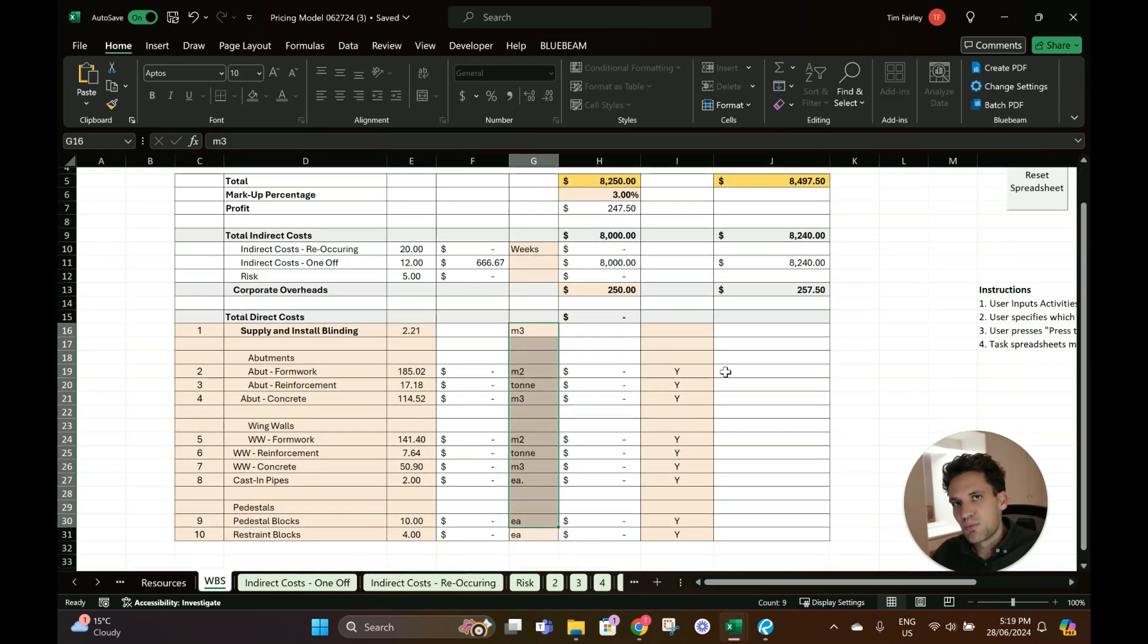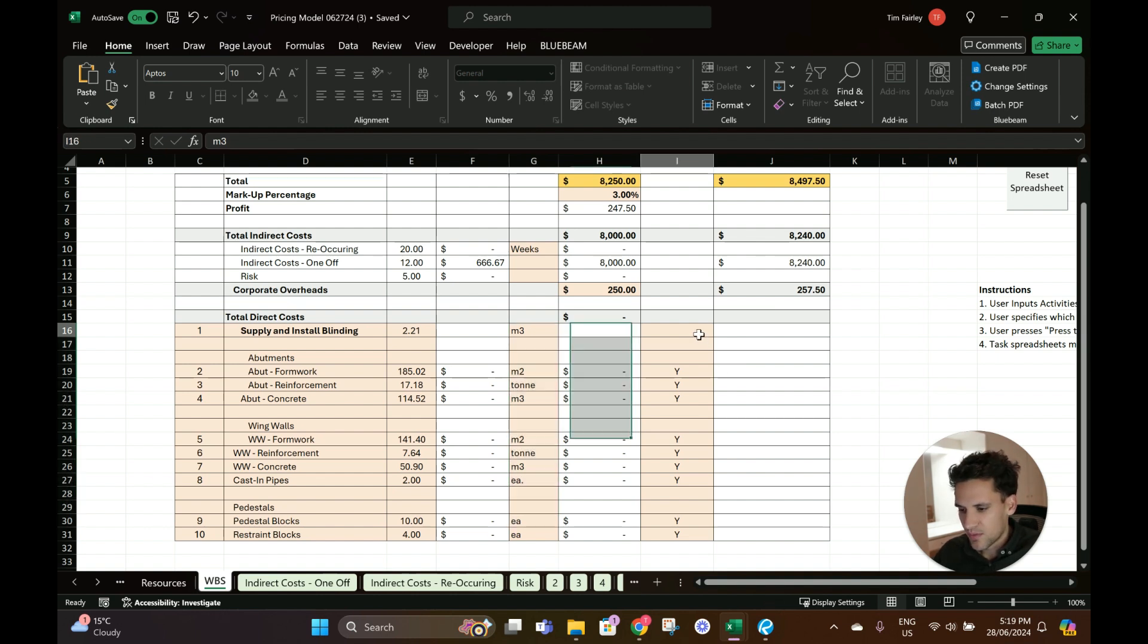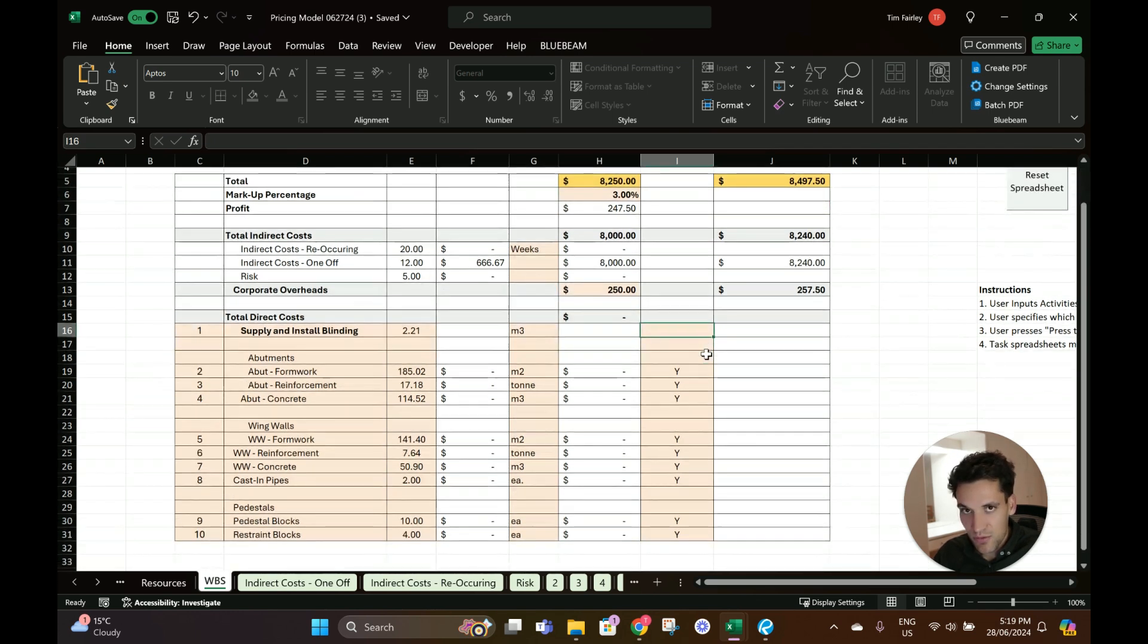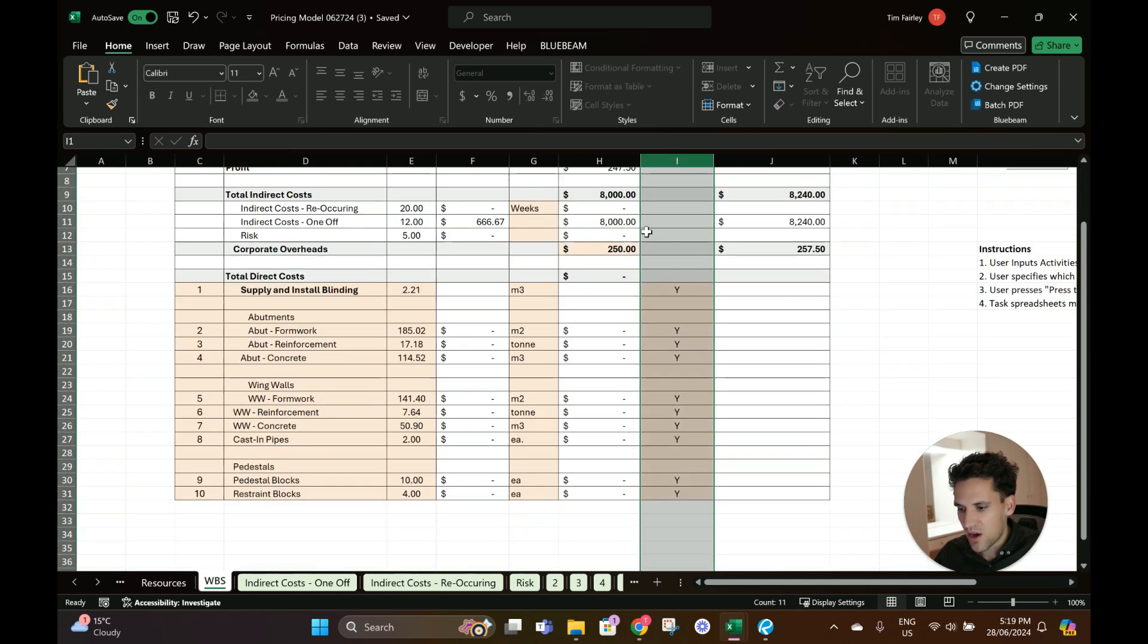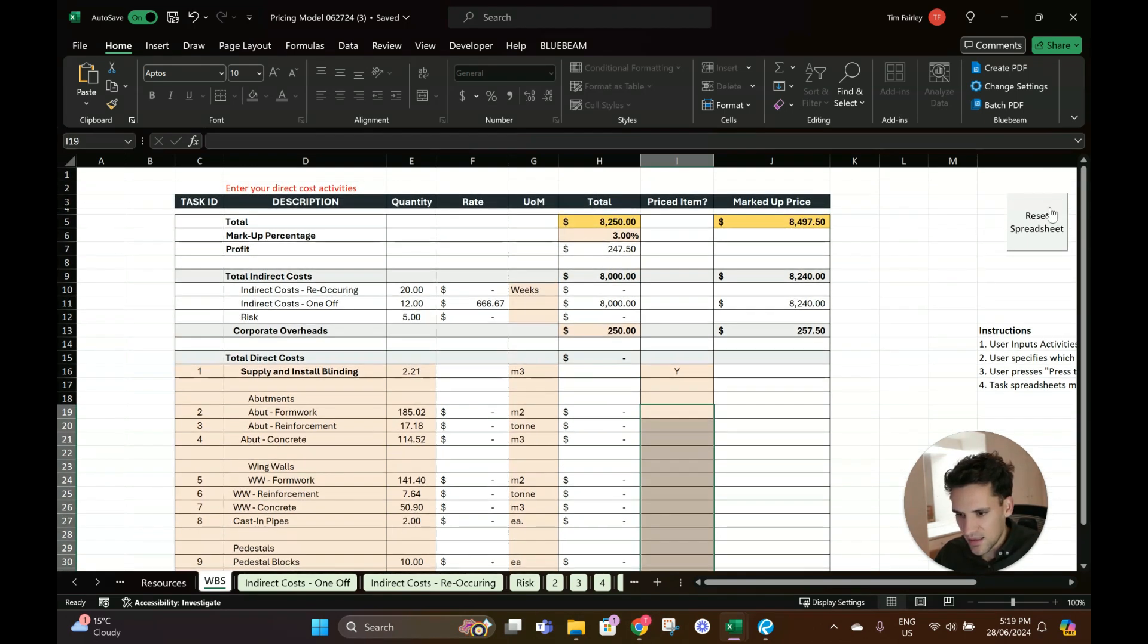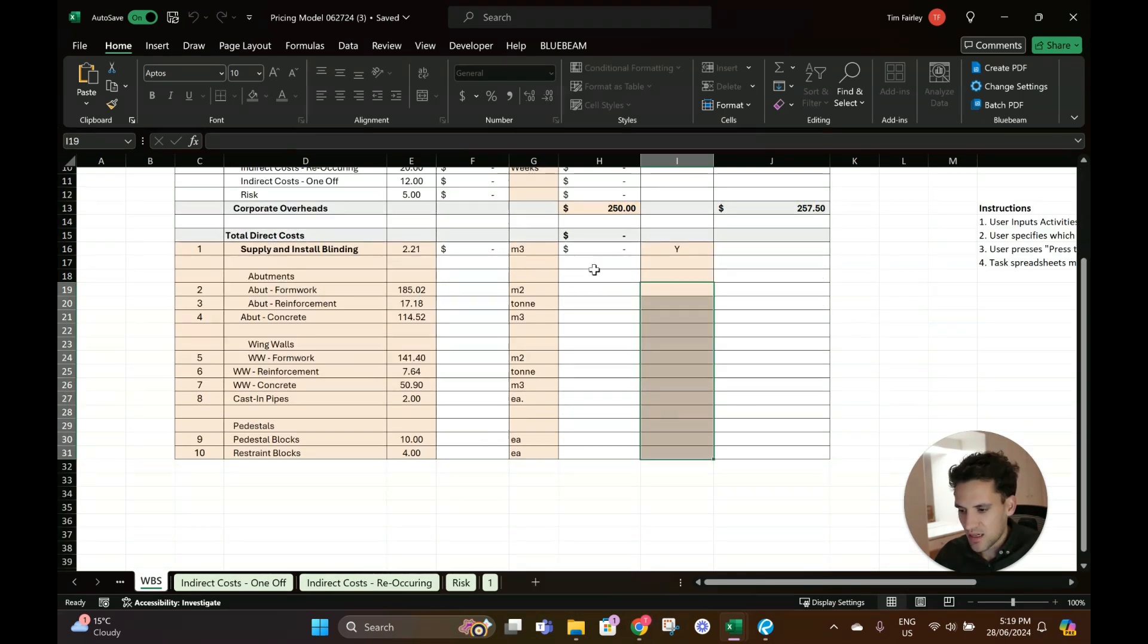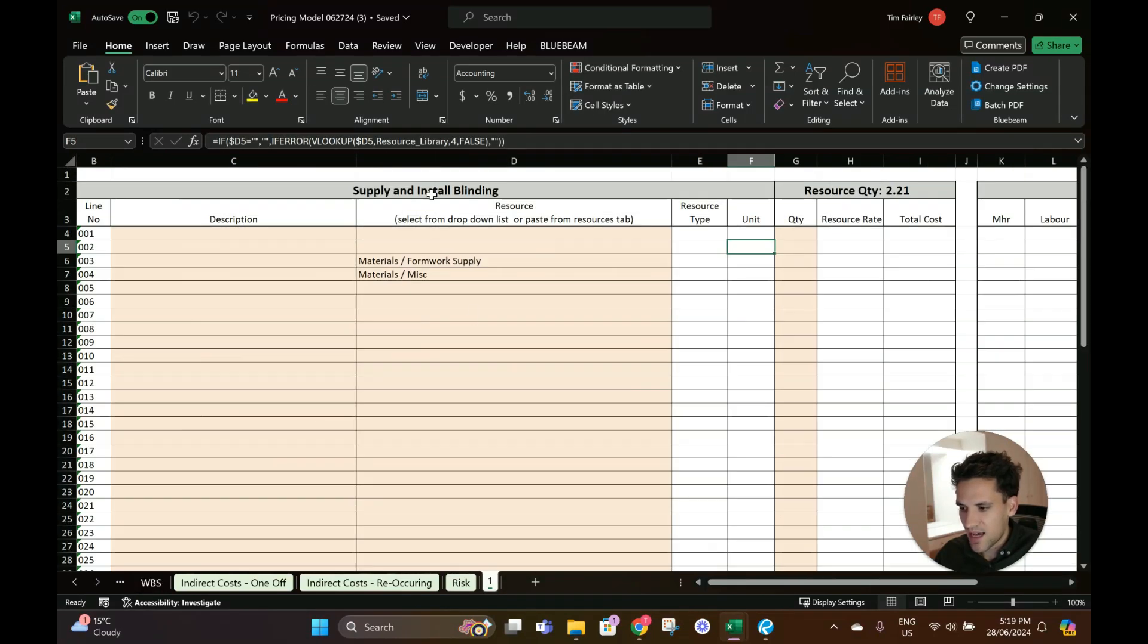The first step you would do is enter these bill of quantity items into the spreadsheet. You can imagine you just copy and paste those items here, the quantities, and then for each of these bill of quantity items - each of these activities - we want to do an individual cost build-up. The important step is when you first get the spreadsheet you have to put a Y in this priced item column to tell the spreadsheet to create a new tab for all of them.